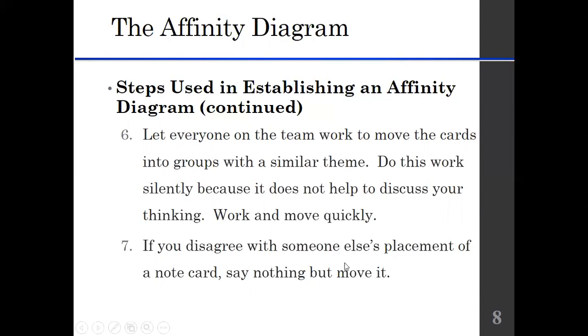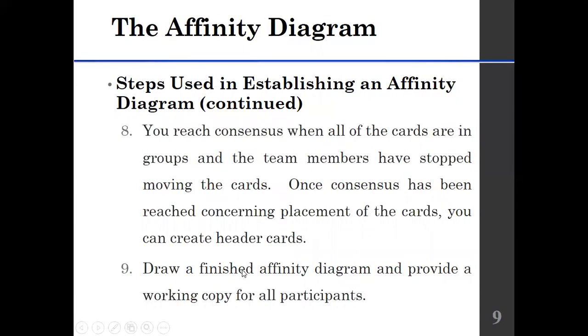If you disagree with someone else's placement of a note card, say nothing but move it. You reach consensus when all of the cards are in groups and the team members have stopped moving the cards.